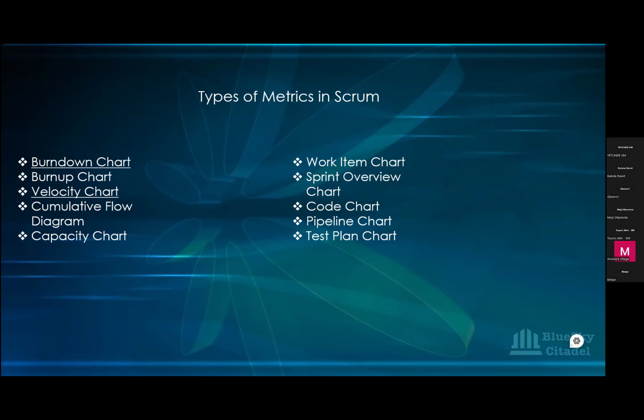And if we don't put the content there, then we're not able to generate the baskets. We're not able to generate the checkout. We're not able to generate the payment. All those are dependent on us having content, because that is what you link all those checkouts, payments, and all that to, isn't it? In order to have a kind of user flow, a user process flow, user story mapping or something they call it. So that could be the problem. It might be because they're not getting content on time.